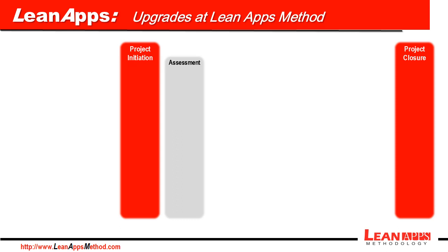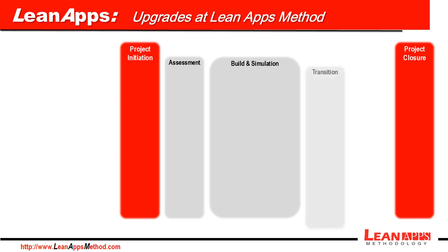Then we have CRP2, whose purpose is to test the vanilla solution configured for the client. So at this phase, setups are executed to reflect the future solution for the client, and the system is intensively tested to search for bugs and fix them. Gaps should be specified in this phase, starting with the interfaces, which should be the first ones to finish being developed.